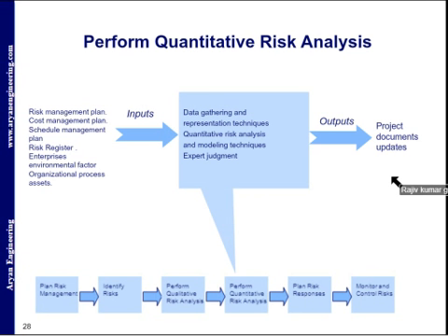The purpose of quantitative risk analysis is to determine which risk events warrant a response, determine overall project risk or risk exposure, and determine the quantified probability of meeting project objectives. That means we only have an 80% chance of completing the project within the 6 months required by the customer, or we only have a 75% chance of completing the project within this budget. So determine cost and schedule reserves, identify risks requiring the most attention, and create a realistic and achievable cost, schedule, or scope target.